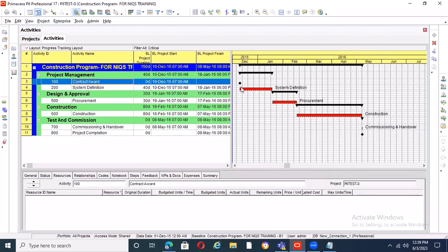So that is the root, or the parts with the start and the finish date activities. You must keep an eye on them. Your eyes must be on these, because any slip here automatically means a slip in your project duration. You're going to have delay.